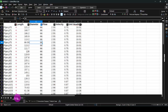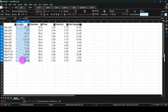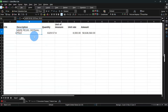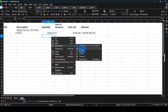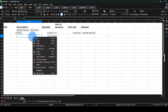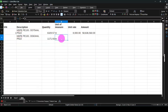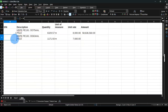Now I want to do the same for the next pipe size. I'll go back and select the diameter filter again. The next pipe size is 63 internal diameter. I'll filter it, and the total length for this one — I'll copy the same value and paste it into the BOQ sheet as numbers. The unit of measure is meters. The description: same pipe material HDPE, but the outside diameter changes to 63 mm — equivalent to a two-inch pipe. The pressure rating is the same, PN10. The unit rate for this one — let's assume 7,000. This is item number two.